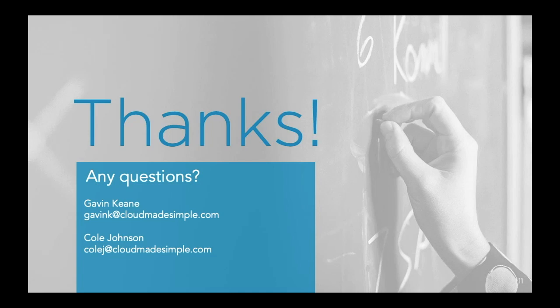Yeah, another question there, how does the scoping process work? Basically, it starts off by a form. We have a project form that we'll send out, and it really helps us understand what it is you're trying to achieve. Then basically what happens is Cole's the project manager. Cole will be in touch and do a rough run through just to do a discovery. After the initial discovery, we go through a scoping process, and that's basically when we start billing for this. And then once the scoping process is completed, it goes into development and then deployment after that. So hopefully that answers the question.